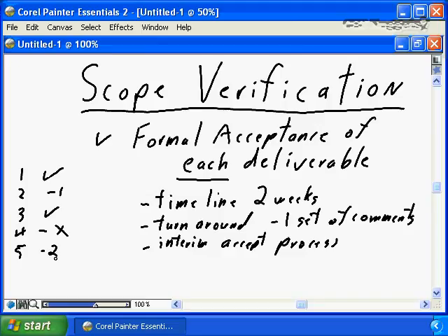So our interim acceptance process is saying chapter number 1 is accepted. It's not open for further revision. If you have second thoughts, if on a second review or third review you want to change section number 1, it's literally too late. If you need to make changes after it's accepted, we'll deal with that with the next part in this nugget, which is change management.